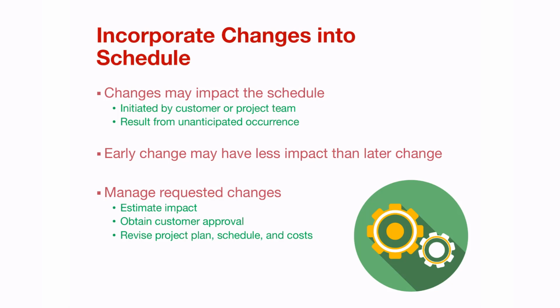You have to incorporate those changes into the project. You have to update the project regularly, and you have to be flexible enough to make those changes very quickly, and also be able to anticipate some changes as well. So if something happens to a particular activity, you need to understand what effect it will have on an activity happening 3 or 4 steps down in the network.